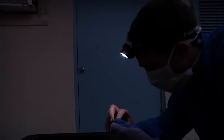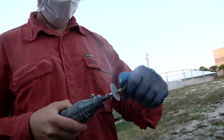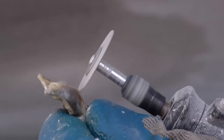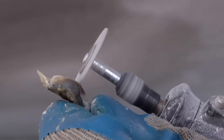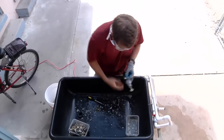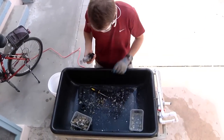What I had estimated to take each team about five hours to do at each site actually turned out to be about a 15-hour job. And so that's why I had to quickly pull myself off of helping with all the sampling of the predators, the sediment samples, and the water samples, to purely deal with setting up this tile experiment.